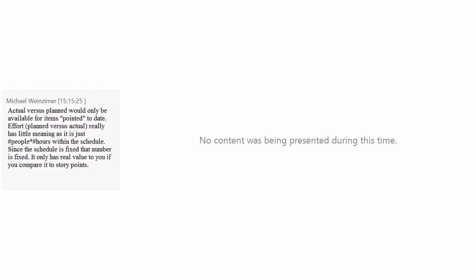But let's assume that this is evenly distributed, which means that from the total story points, which is 1372, divided by half, that would be 600 and 86, right? 686.